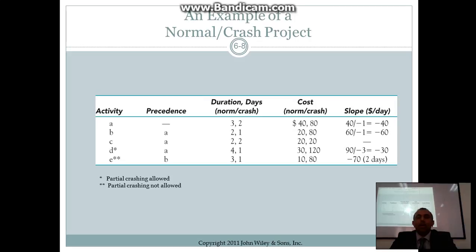Okay? Again, then we have D and E. But it's not good to crash. If you want to speed up the project, that's fine, but it's going to cost you more. Unless you have to. Crashing means you have to do it faster, and when you do something faster, you have to spend more money, which is more people, more resources.